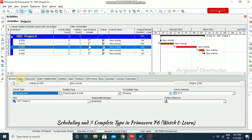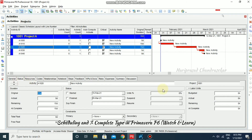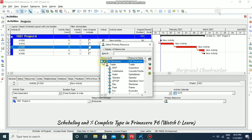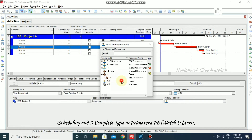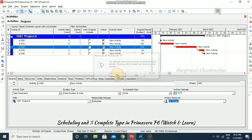In general we also have the units completion type, but this is only available if we have a primary resource or some other resource assigned. Going to status, we can't input unit values without a resource. Going back to general, I'm selecting a primary resource — selecting a person. It asks 'Would you like to assign this resource to the activity?' — I'm putting yes.